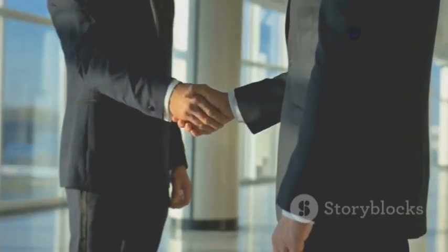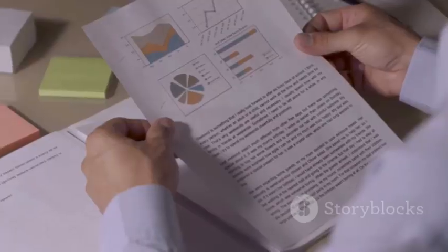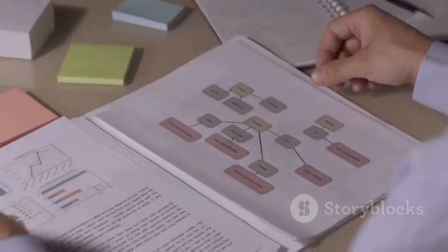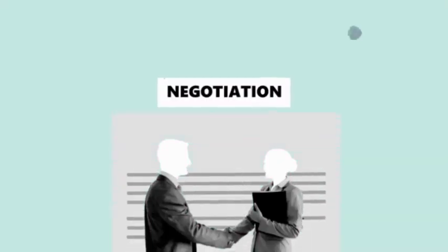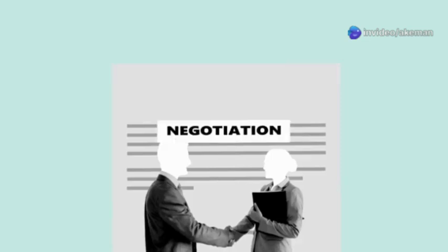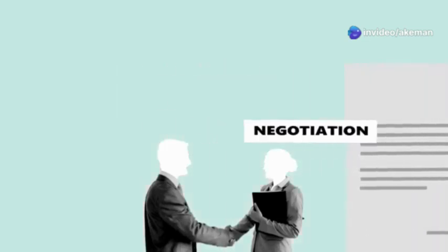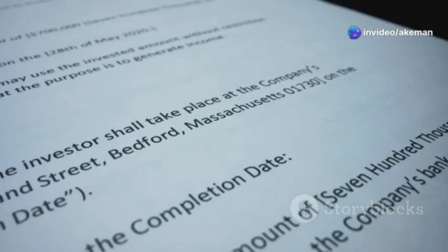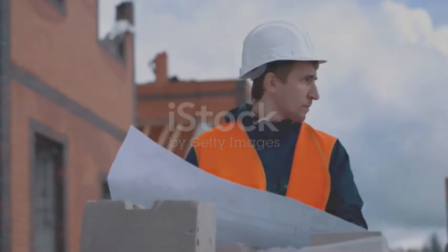The clause must be commercially justifiable. Difficulty in pre-estimating loss can help. If it is very hard to calculate the exact loss in advance, then a reasonable agreed sum is more likely to be upheld. The words used in the clause are considered. However, they are not the deciding factor.